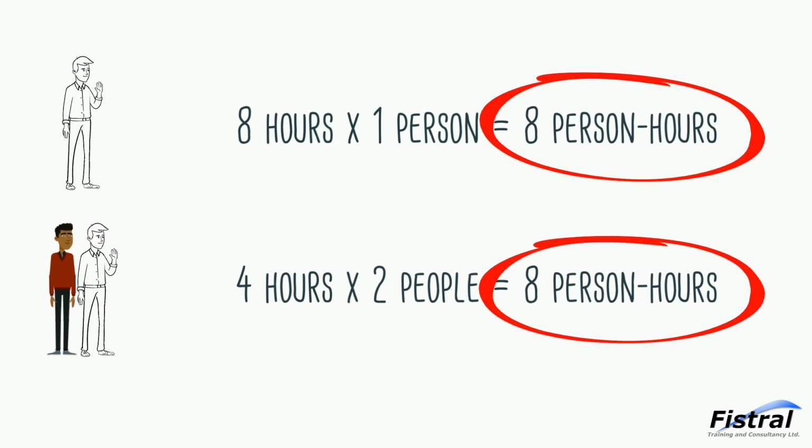And this is how most finance departments, particularly within universities, consider resource on a project. It's not initially monetary, but hourly FTE spend that they use to calculate resource budget. Okay, I might need an extra paintbrush, but the cost hasn't been doubled, which is what people intuitively think. Your real problem here is not cost, but whether there are other resources capable of helping out. But that's a resource and skill set issue, not really a cost one.